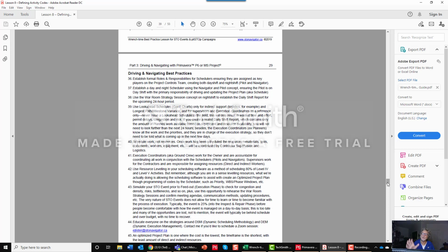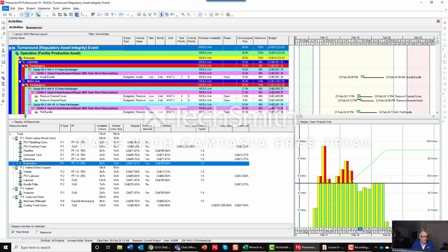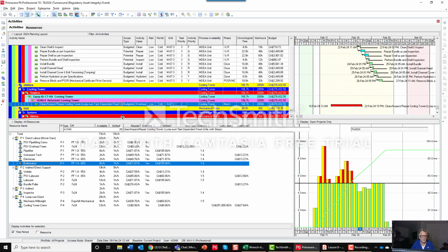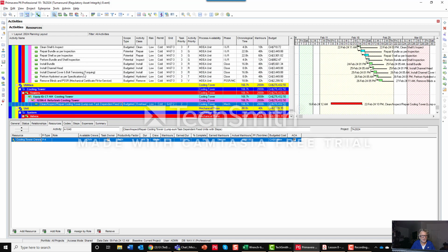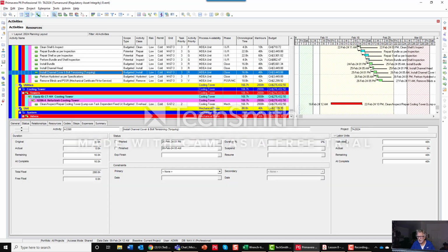And it typically takes me 24 hours or 48 hours to get that actual hour available from a contractor in order to calculate that. And you'll see here when we're in P6, people do get confused around activities. For example, when I'm talking status here, budgeted labor units, this is actual. This should say earned over here. Okay, this is confusing for a lot of people. Terminology around P6, but remember, P6 was not designed for stop events. We have to use the workarounds by programming.